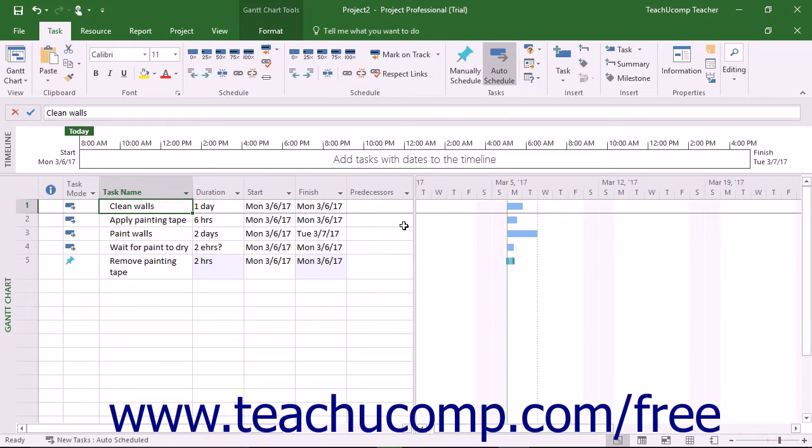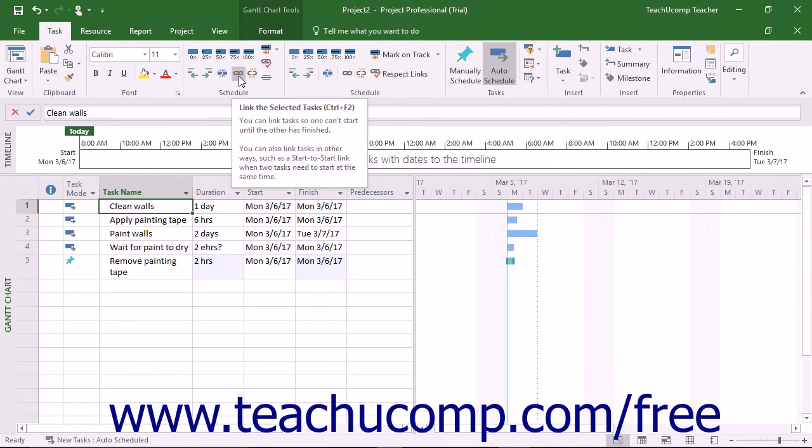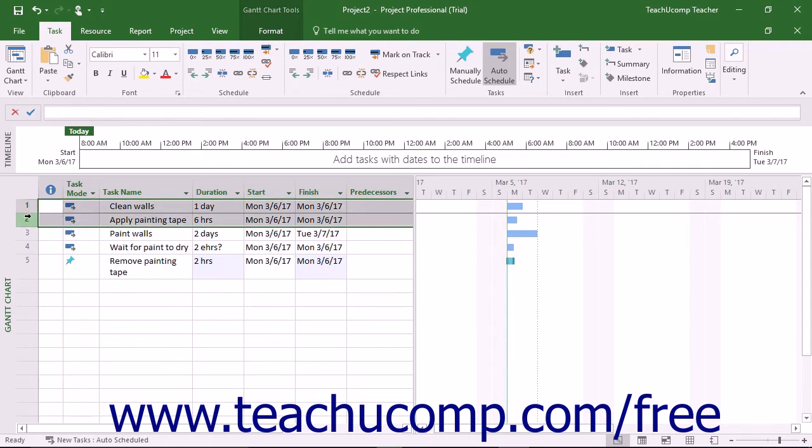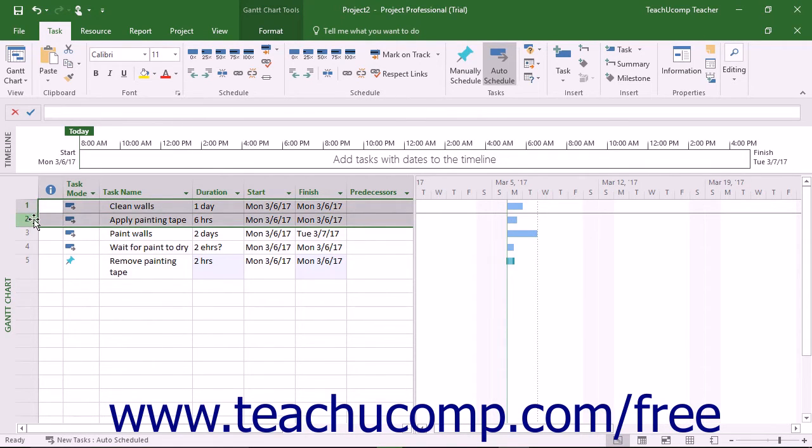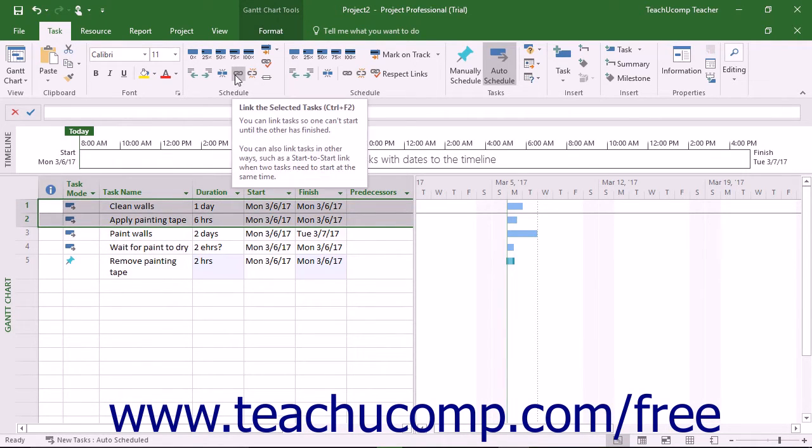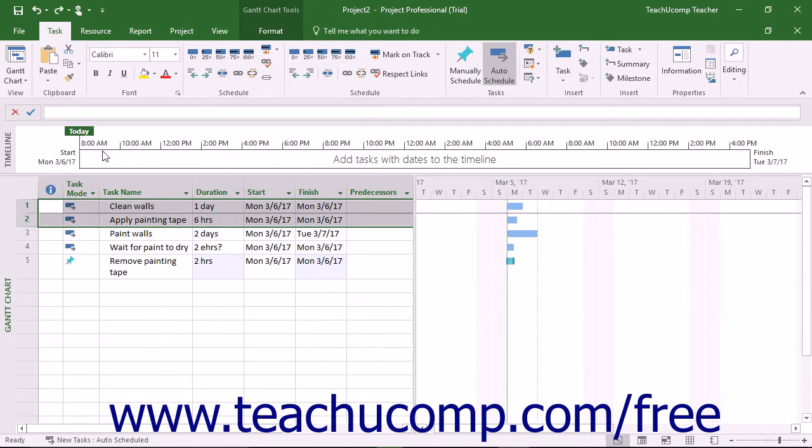This type of link is created when a user clicks the Link Tasks button that appears in the Schedule button group of the Task tab in the ribbon. To create a link between two tasks in a project file, first select the two tasks to link within the task list of the project's Gantt chart view. To create a Finish-to-Start link between them, click the Link Tasks button in the Schedule button group on the Task tab in the ribbon.